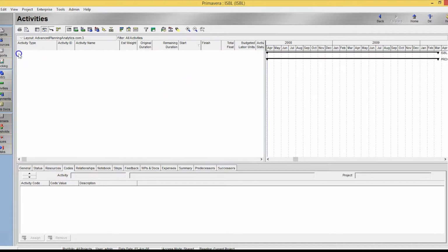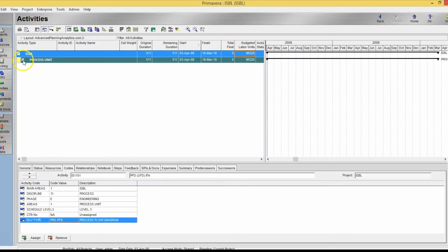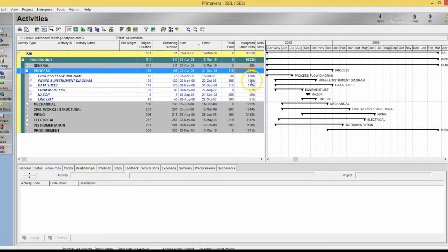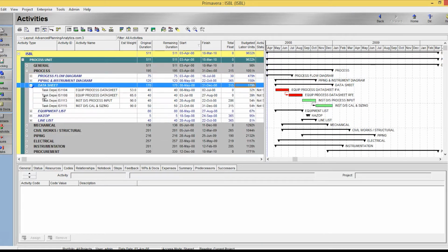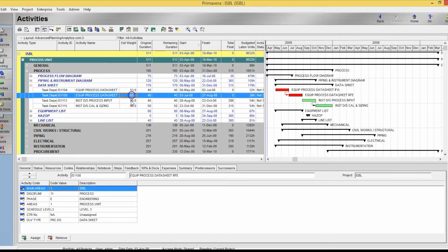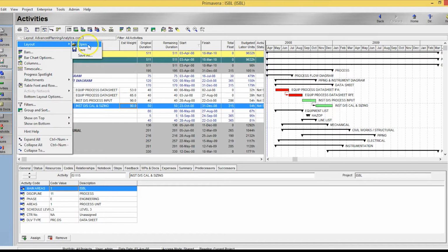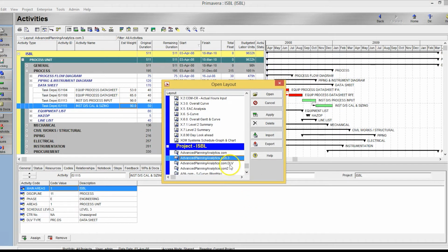Let me go back. It'll add the distribution of hours here. You see, I've already done this according to the WBS first. Then it takes the hours beneath that WBS and uses the estimated weight here to distribute those man hours across. So it's a weighting of a weighting. It's a weight factor of a weight factor. Okay.